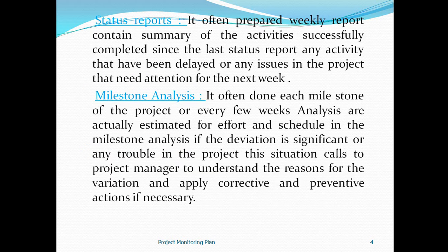In the status report, a weekly report is prepared. It contains a summary of the successfully completed tasks from the last report, or from the last week. Any activities that have been delayed, or any issues in the project, will be the focus in the next week.